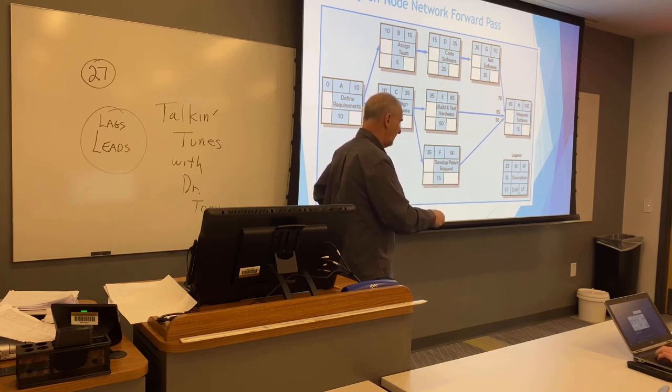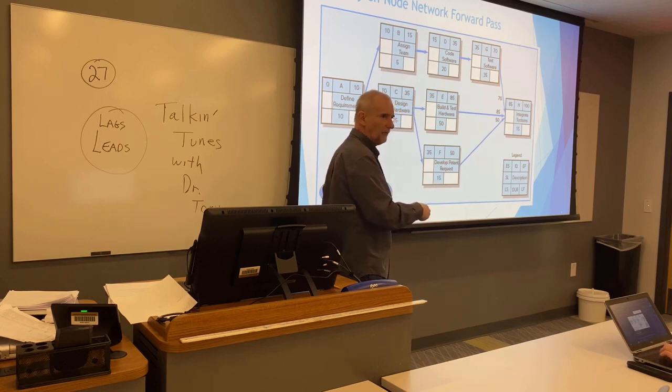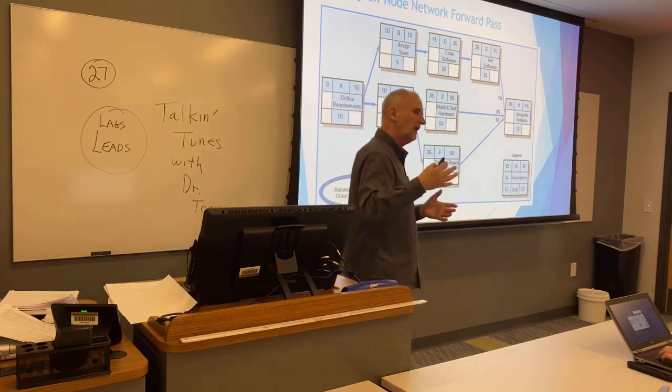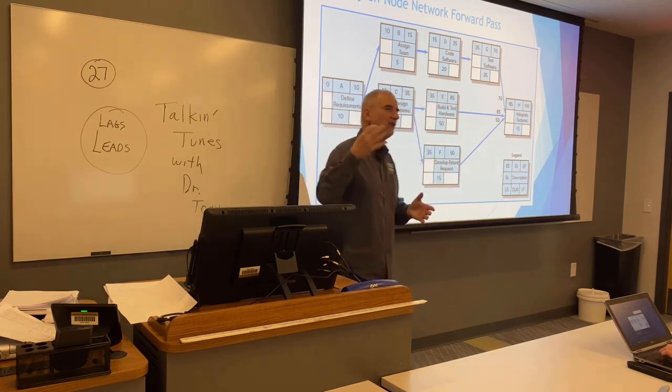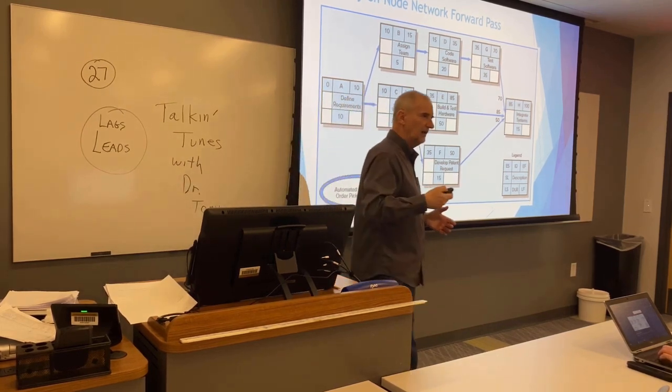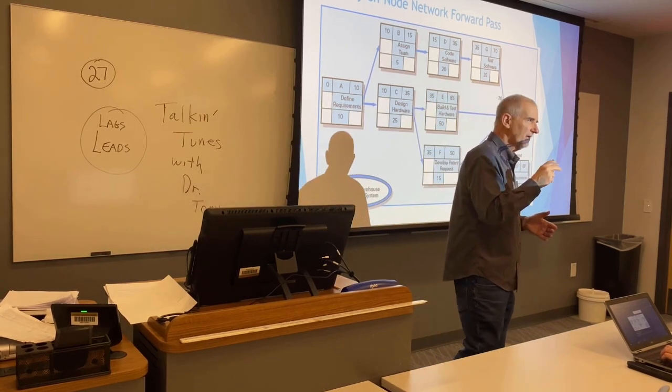So guess what is true? What does this represent right here, SL? Slack? What's going on with these two? What do they have? Slack. They have free time, don't they? Because they could end up later, be done later, as long as it's not too late. As long as it's not later than what time? 80, 85. Very good.